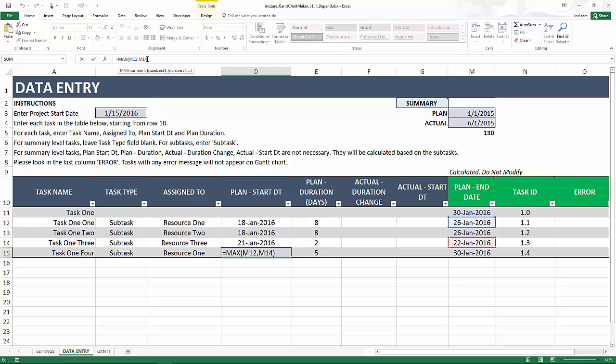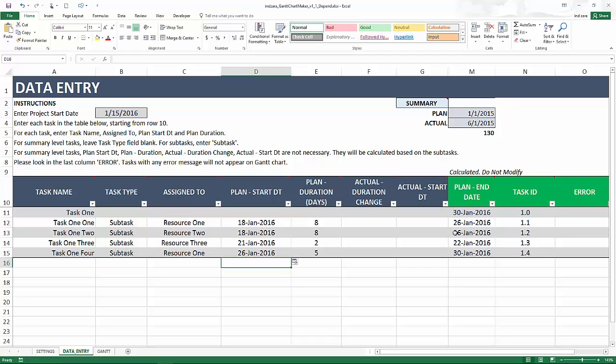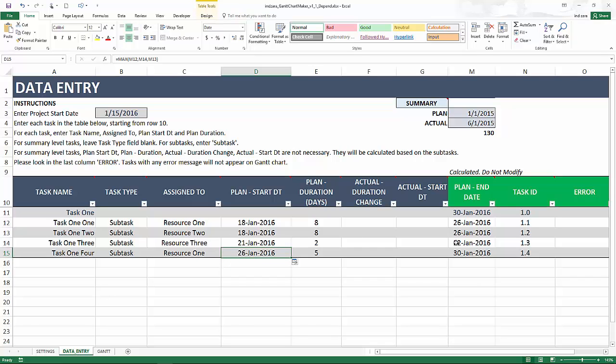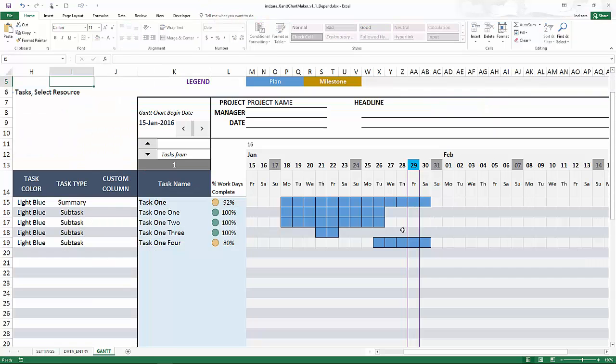I picked this example so that we have multiple tasks so you can select any specific task as predecessors. If I want to edit this, I can go in here and then put a comma and let's say I also want to include the second task as a predecessor so I select that, hit enter. So now this actually is dependent on all three previous tasks. You can also see that in the Gantt chart accordingly.